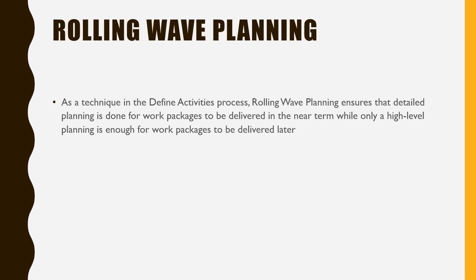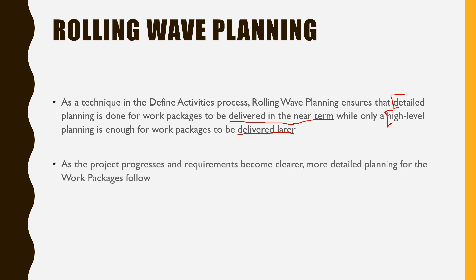Rolling wave planning is a technique in the Define Activities process. It ensures that detailed planning is done for work packages to be delivered in the near term, while only a high-level planning is enough for work packages to be delivered later. So for near-term work packages you do detailed planning; for later work packages, high-level planning is sufficient. As the project progresses and requirements become clearer, more detailed planning for those work packages can be done. To be precise, you basically plan as you go.